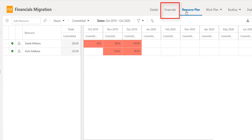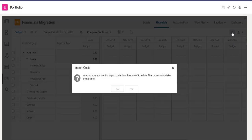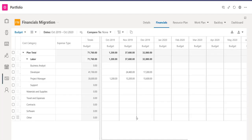I may also want to go to my financial plan and update the financials. Here I will import the resource plan hours converted to costs into my project budget. And here are my labor costs based on my schedule that I just built in Project for the Web. Daniel is a project manager and Kono is a developer. Now that I have visibility into my labor costs, I can also enter my non-labor costs, such as travel these next couple months, and perhaps also software.